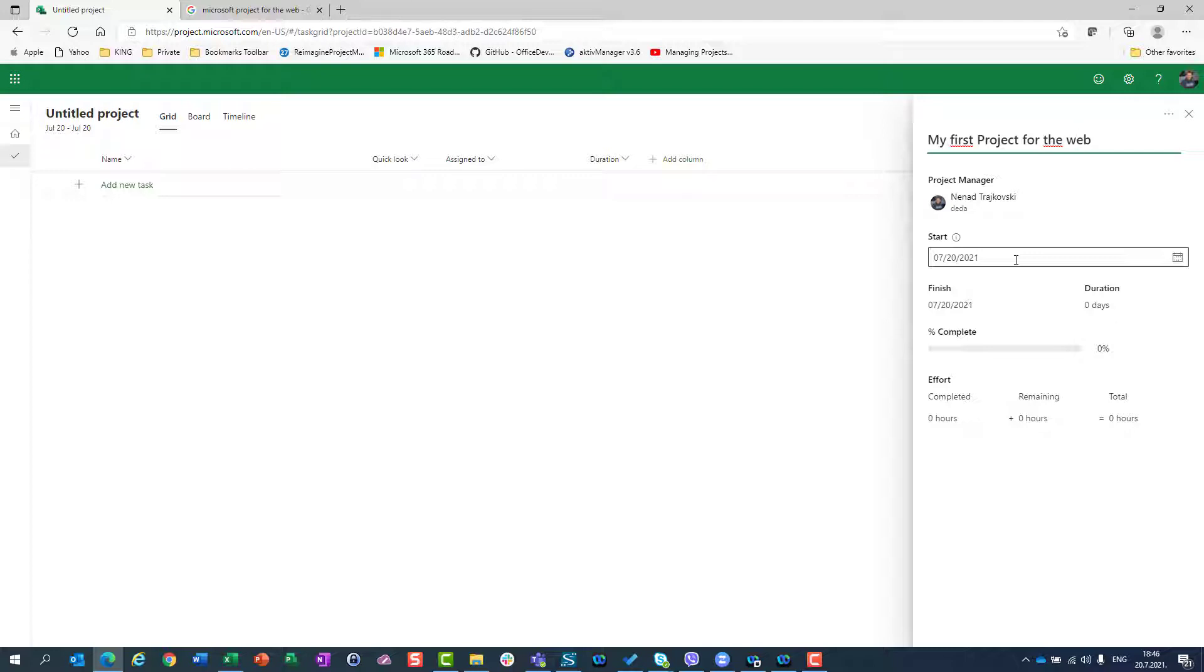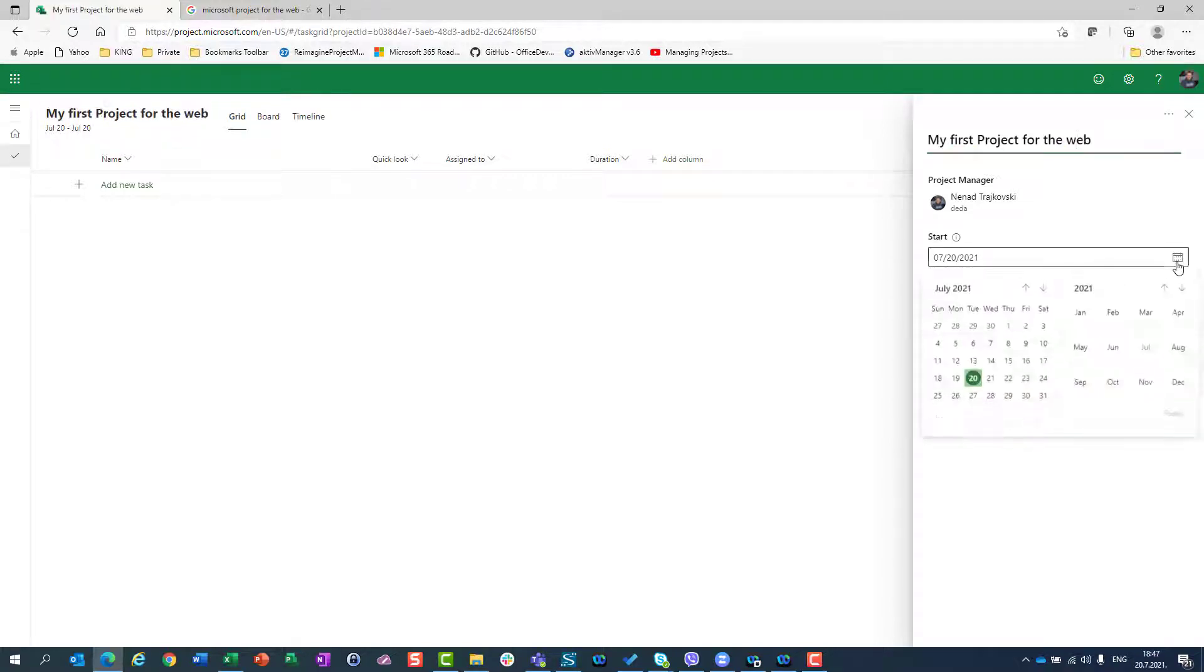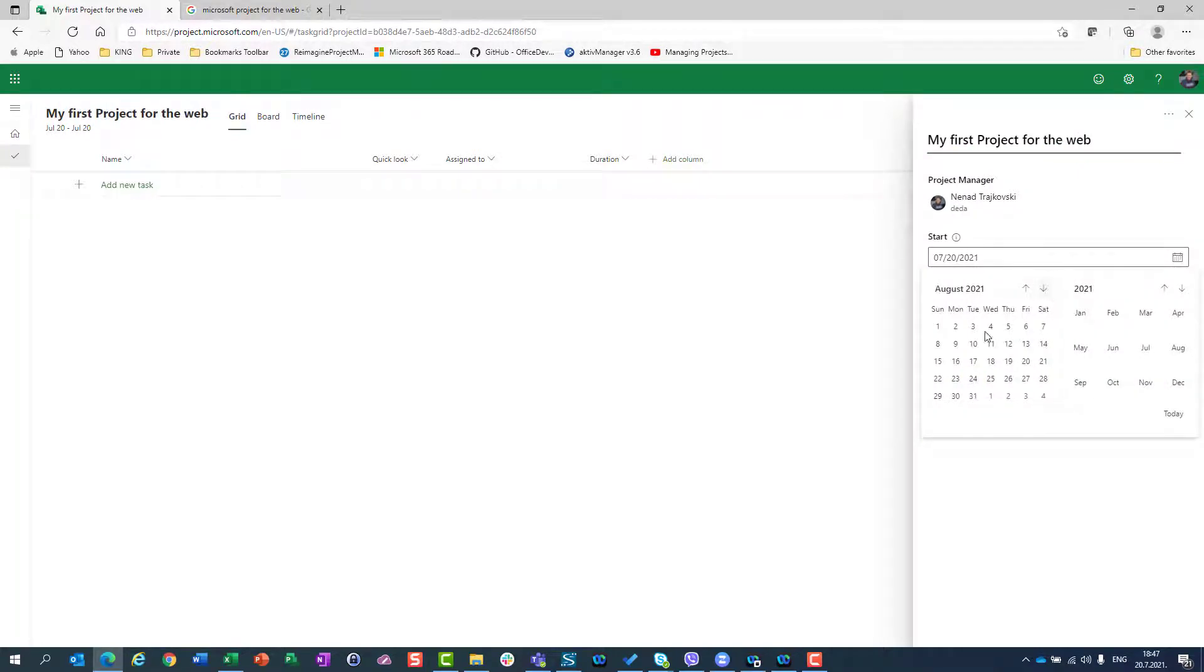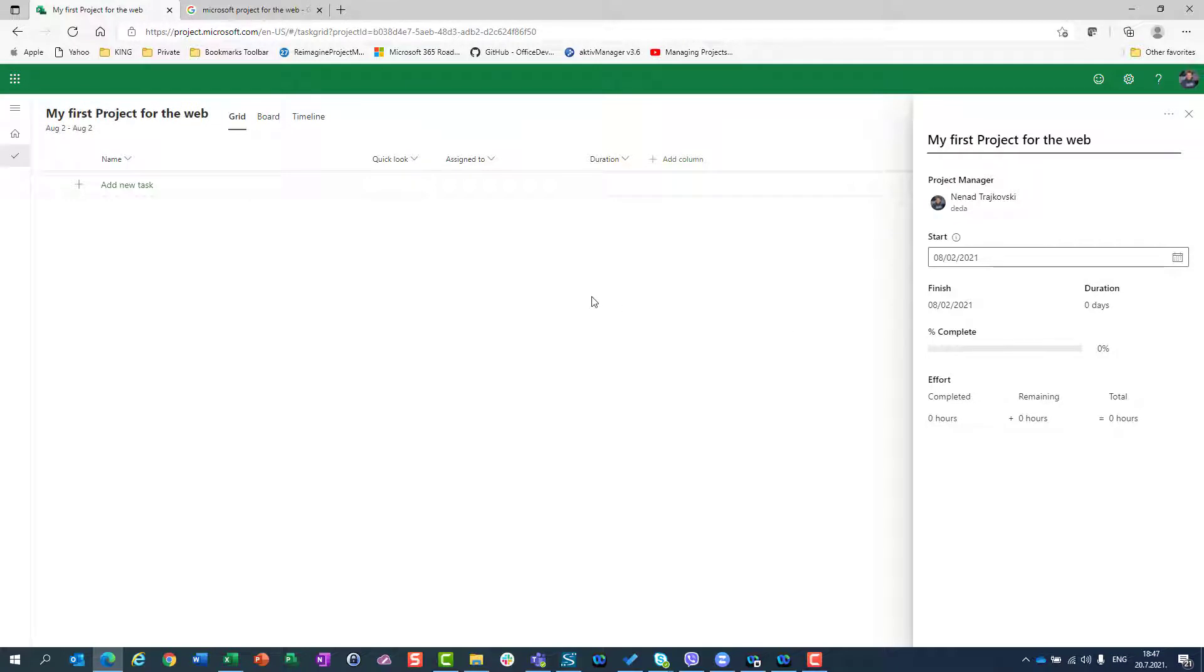This is the defining of a start date, when your project is planned to be started. Because it depends on this date, the whole schedule will be built. So I'm going to click on start. I'm going to choose, let's say, 2nd of August. And this is my project start date.